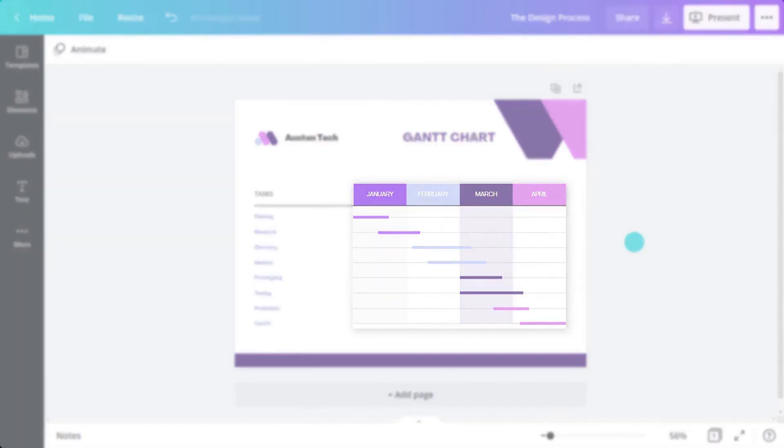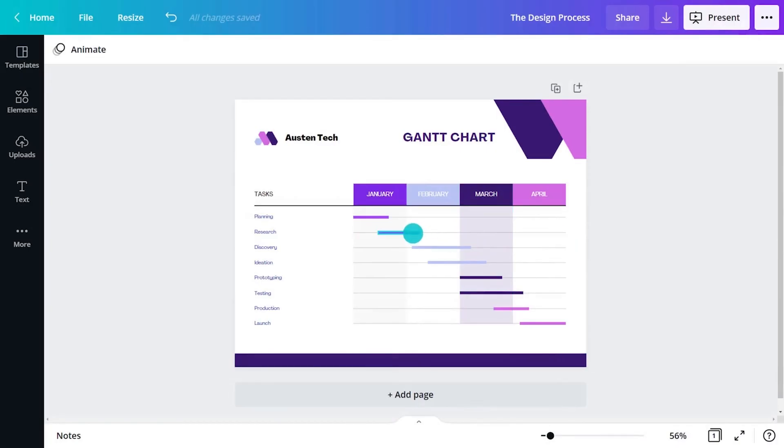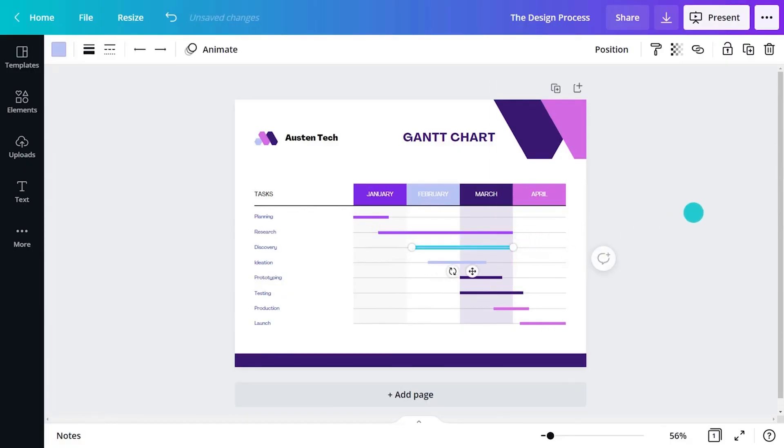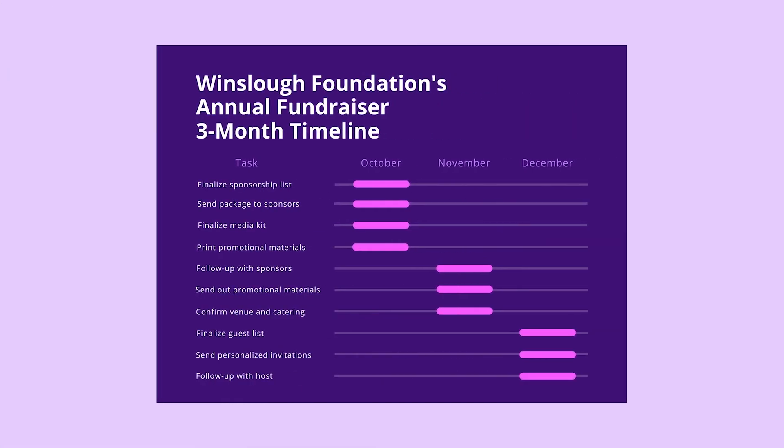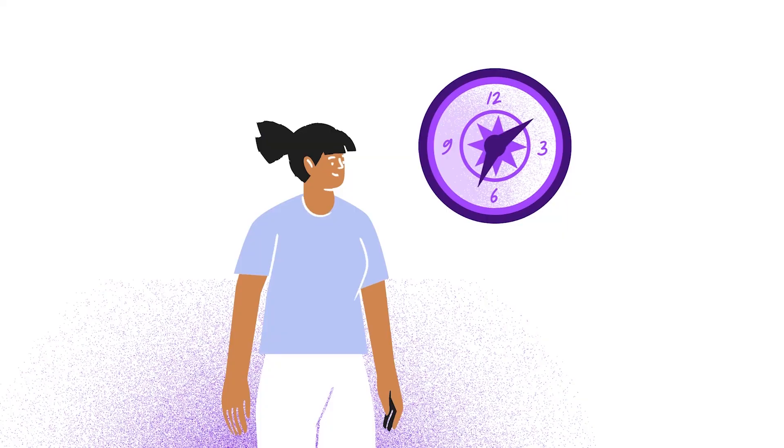The bars show the length of each phase and how phases overlap. If one phase relies on another, this is called a dependency. Gantt charts help us understand how projects get blocked when individual phases stall. The beauty of this chart is it shows complex things in a simplified, visual way. Gantt charts remain fluid. Every project looks unique, with different emphasis on each phase.